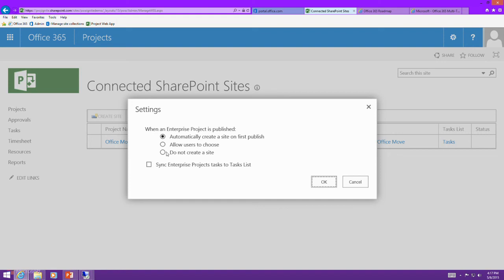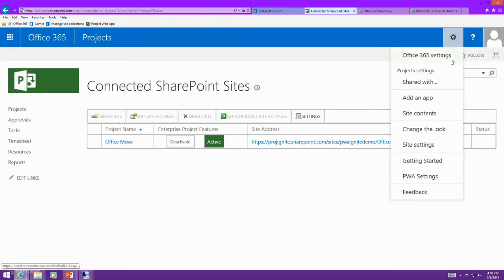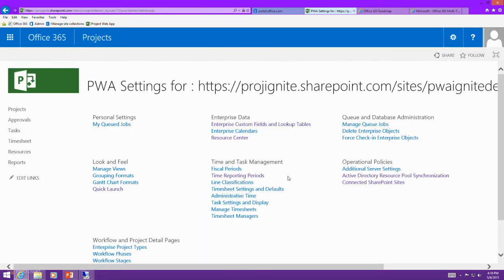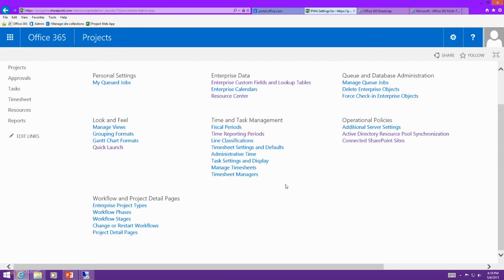Right, currently. So you're my perfect user. What you want to do is disable... are you in SharePoint permission mode or project permission mode? Do you know? Not sure. Okay, so you need to switch into project permission mode. And then you can turn off what we call internally WSS user sync. Let me look up what the external name of this is. Oh, fortunately this is not in project permission mode. What you want to do is turn off user sync for the project sites.